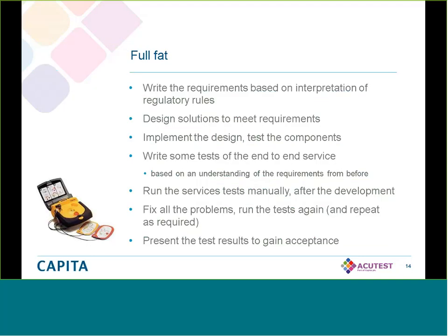There is, of course, the last approach, which is a kind of full fat approach, where you waddle your way to the end, doing absolutely everything in sight. And again, we see this more and more. We see people write hundreds of requirements based on interpretation of the regulatory rules. And sometimes they go away and code them and come back months later with them all wrong. So there's a big exercise for requirement writing, and they design the solutions.